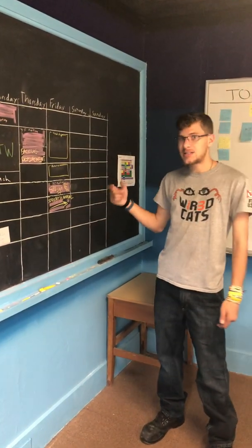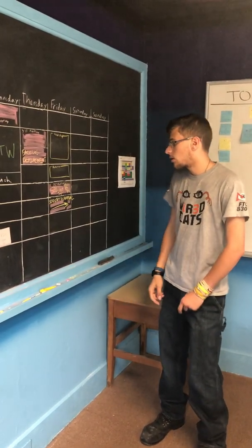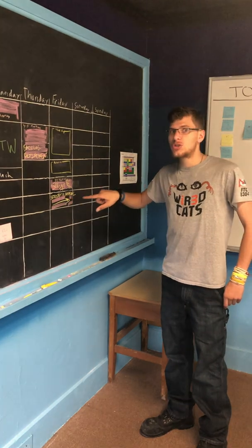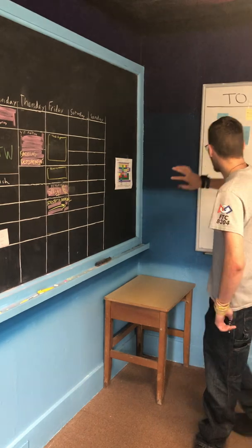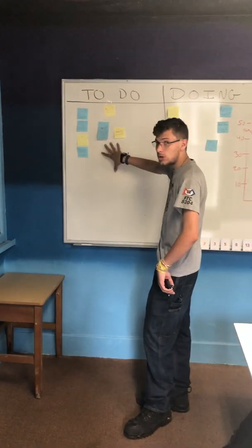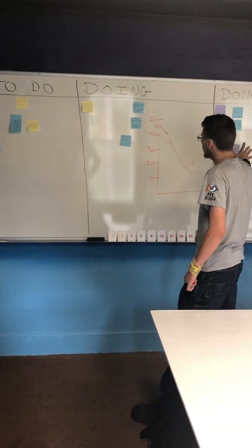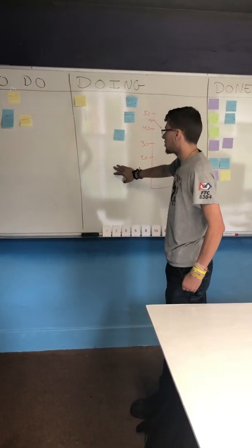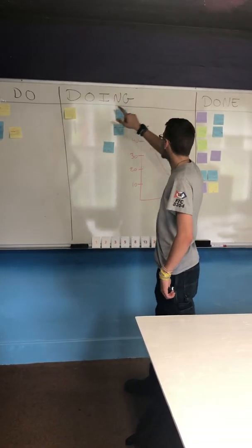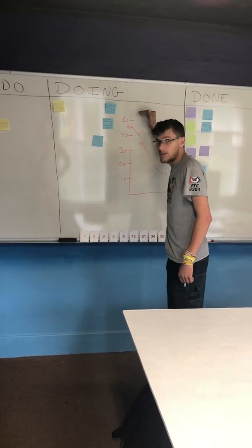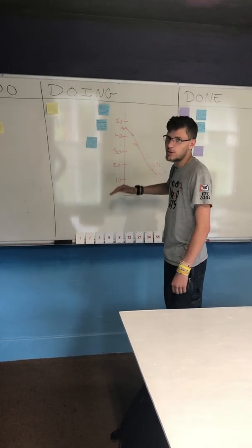And then finally, our last step for Fridays is sprint planning. That's because this is the official start of the next sprint. We will take the user stories here in to-do and move those over into the doing section, then add up all the point values we give them and create a new burn down chart to get ready to work through those during the week.